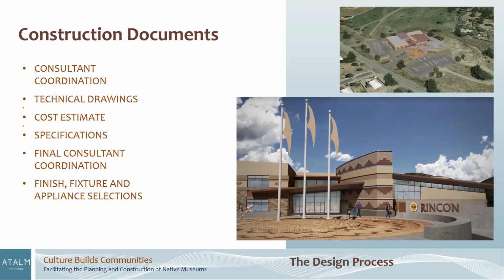As far as contractors, there's different ways to set it up. This was a project also that we had a contractor involved from design development on, and it was, as we would call, theirs to lose. It was kind of a contractor's assist. And what that brings in is it brings real value estimating, because they have to promise they can build what we're drawing. It does cause some conflicts. Sometimes contractors and architects honestly are oil and water, but I think it's the smart way to go.